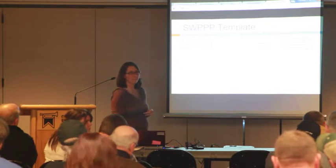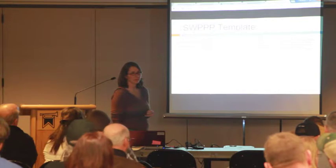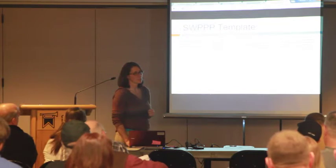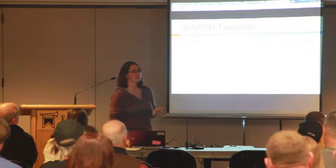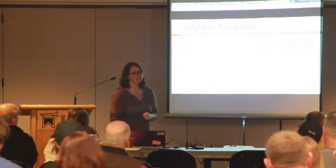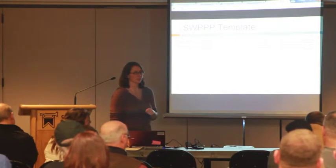I guess that brings me up to another question. Say that I am able to find that information out, and I have 20 repairs along that whole span of pipeline. What if I had that significant rainfall event happen only at 2 of the repair locations? Would I be required to inspect all of them, or just wherever the rain occurred? You would just need to inspect where that event occurred. So if you've got 200 miles of pipeline and 2 miles of it were affected, as part of your inspections you would go out and look at that section after that precipitation event. Okay, thank you.